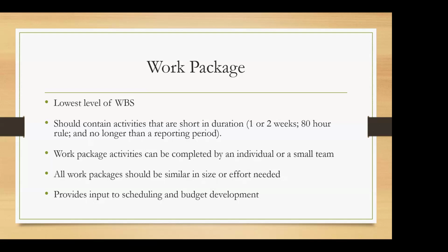When I say similar in size, it can mean similar cost, or similar time frames. The effort that you have to put in can be similar as well. Once you define the work packages, they will be an input when you are doing the scheduling as well as the budget development.